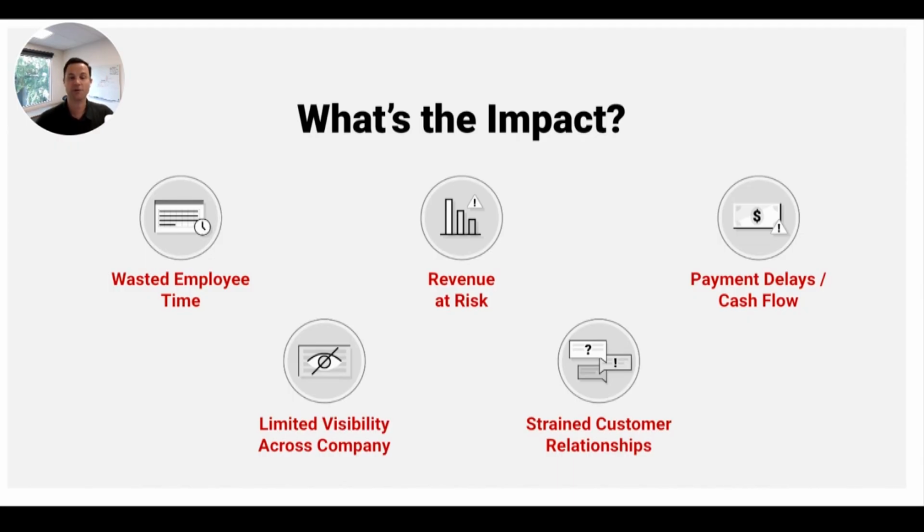When it comes to cash flow, depending on what volume of change you do as a company, whether it's 5%, which is what we see on the low end, all the way up to 40% of specialty contractors' revenue, can be made up in change orders. And it can be a huge strain on cash flow. And what you don't want to do is be financing the job, waiting on change orders to get approved, because maybe you've already paid your team.